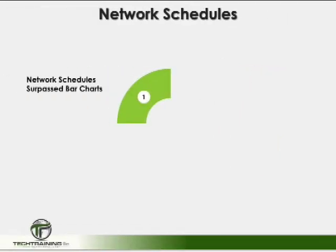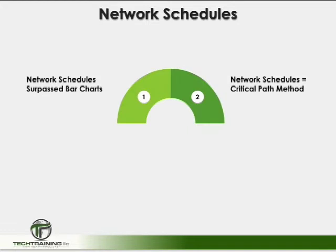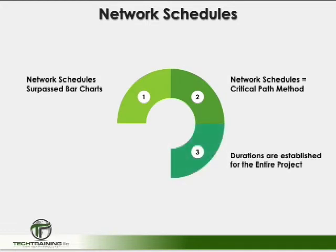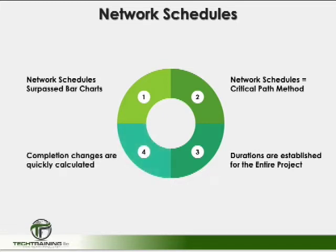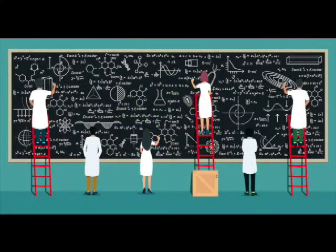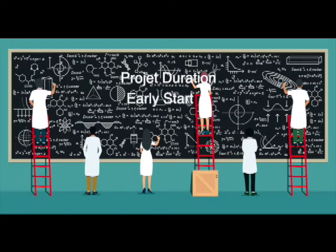Network schedules became the favorite of the construction industry, especially on larger projects. The network schedule is considered a CPM model. Using the critical path method, each task is assigned a specific duration, allowing the construction manager to create calculations that run throughout the entire network of tasks. These algorithms give the manager the earliest a project is expected to be completed, the earliest any activity can begin, the latest any activity can begin, and the impact of any delays on the project.